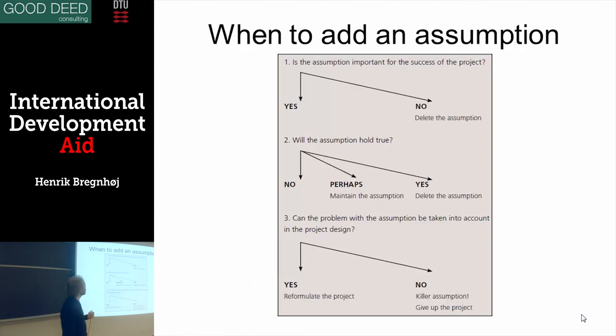When should you add an assumption here? You should ask yourself, is the assumption important for the success of the project? Then you should add it. Otherwise, delete it. Don't put all kinds of silly assumptions. Try to evaluate: is it important for the success of the project? Will it hold true? Do you think it is realistic here?